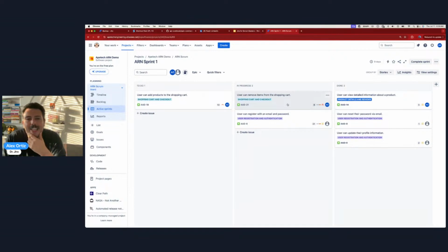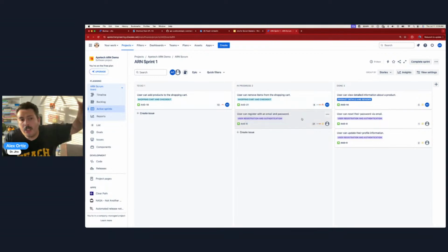In this particular case, when we get to the end of the sprint, you have really two options. You either accept the fact that these items are going to roll to the next sprint, not healthy, or you can split your stories, right? There are all kinds of beliefs around this as well. But Jira, I will tell you, this is not a personal belief of mine. I believe in getting ahead of the problem, which is make your story smaller at the beginning so you avoid these problems. But if you absolutely get to this problem, you can, as an option, roll your story